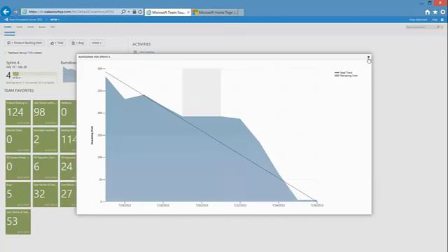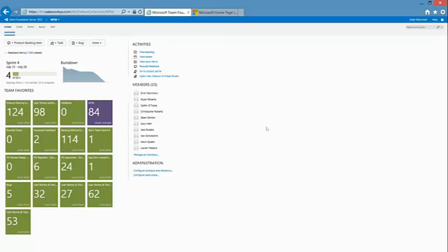So in order to get this kind of view and exposure on what your team is up to, you need to go through the process of the Agile planning behind that. So let's talk about that. From here, what we would do is define our product backlog, or list off all of our user stories and catalog those in TFS.